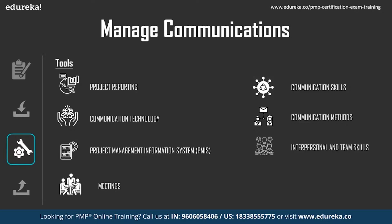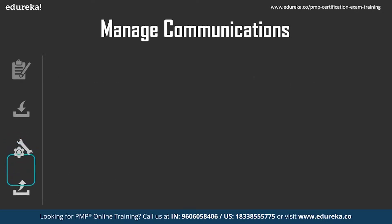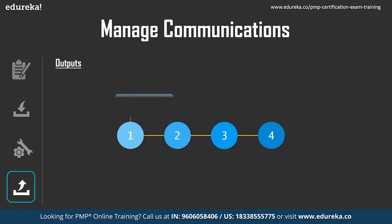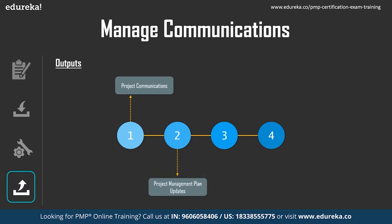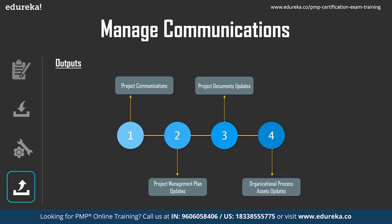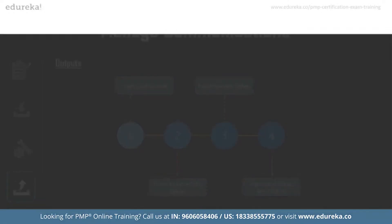Tools used to manage communications include project reporting, communication technology, project management information systems, meetings, communication skills, and communication methods. Outputs of the Manage Communication process include project communications, project management plan updates, project document updates, and organizational process assets updates.